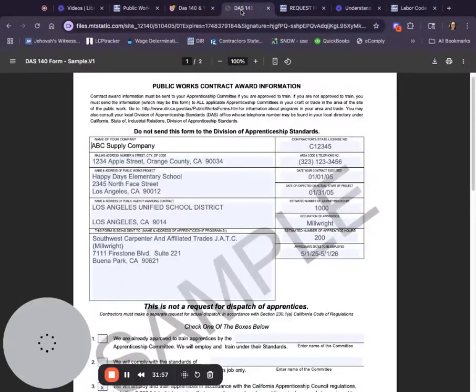Okay, part 8, a quick recap. Some of the things we're going to ask for, and I'll make a checklist, is whether the contractor is self-performing or using subcontractors. Remember, if they're self-performing, you complete these forms for them if they're our client. If they are not performing anything and are subbing it all out to other people, you're going to check on those subs and make sure each of them submitted the correct forms.